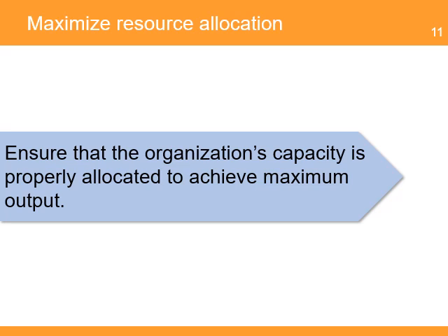In this responsibility, the portfolio manager determines the organization's resource capacity to assist with the selection and prioritization of portfolio components, analysis of the current versus demand capacity to ensure that our organizational resources are properly allocated. The goal is to make sure the resources are fully allocated to achieve maximum output. Whenever there are changes in the portfolio components, the portfolio manager re-evaluates the resource allocation, changing the priorities, and recommending changes to maximize the utilization of resources.